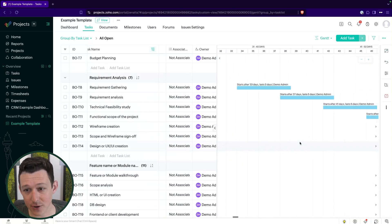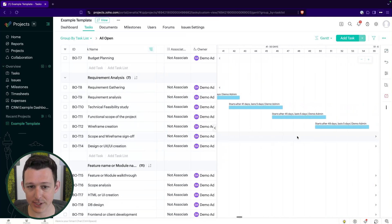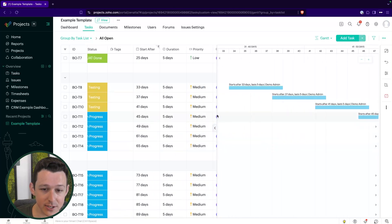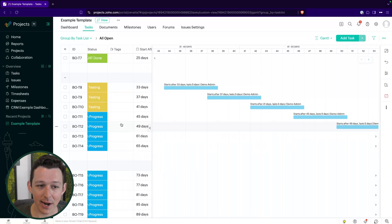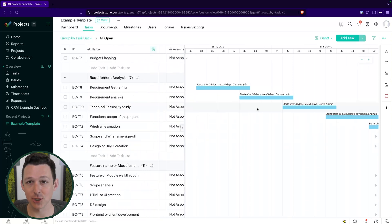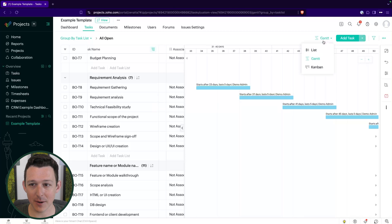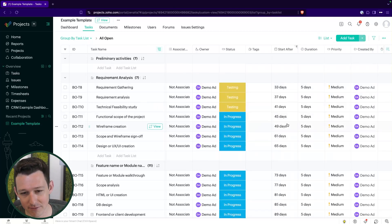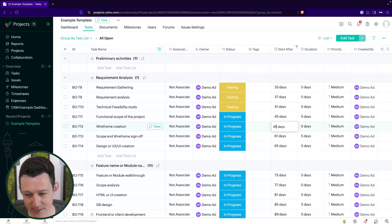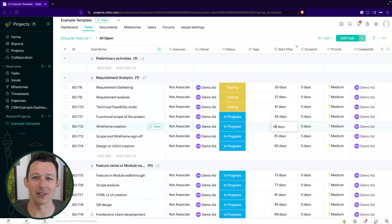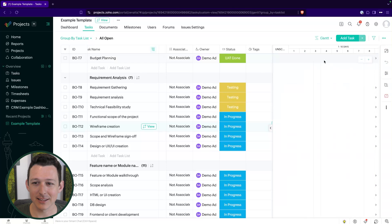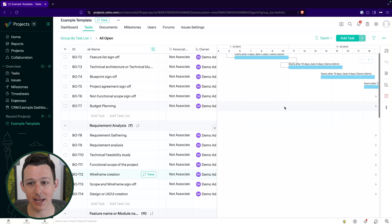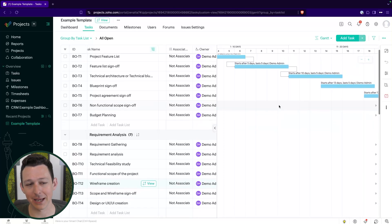From here, you're going down the entire list you've created and adjusting start dates and dependencies. I do a lot of this from the Gantt chart view rather than looking at my list and manually calculating — this is 45 days, I'll add five days, so this technically needs to be 50 days. I like the visual view of the Gantt chart because it allows me to get this done a lot more quickly and accurately without a lot of pain and suffering.